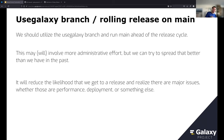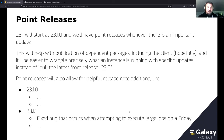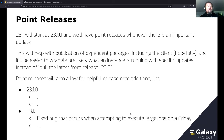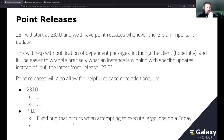Wrapping up: we definitely want to have point releases. We'll publish 23.1.0 as the first one, then 23.1.1, 23.1.2, and so on. Each point release will have a specific set of bugs fixed between versions, so we can tell a deployer: to fix the bug you're talking about, you need to update to 23.1.3, for example. This is basically ready to go and we'll start doing it with 23.1.